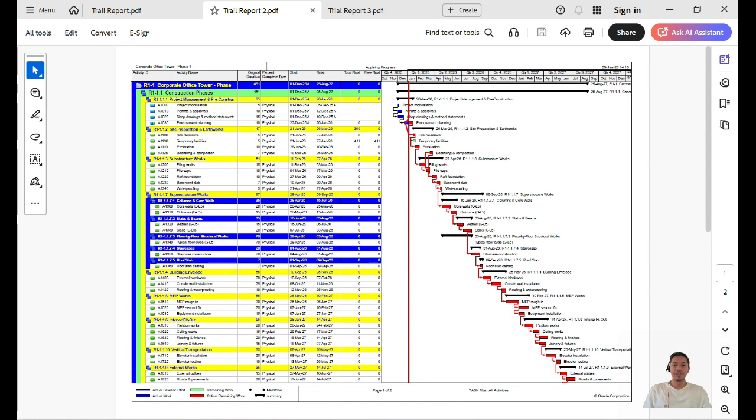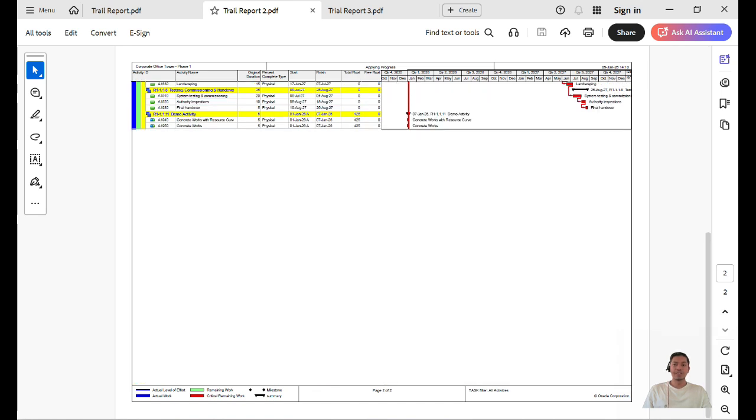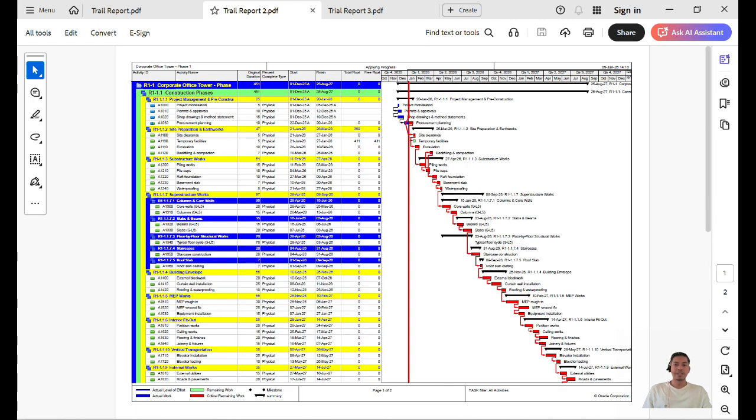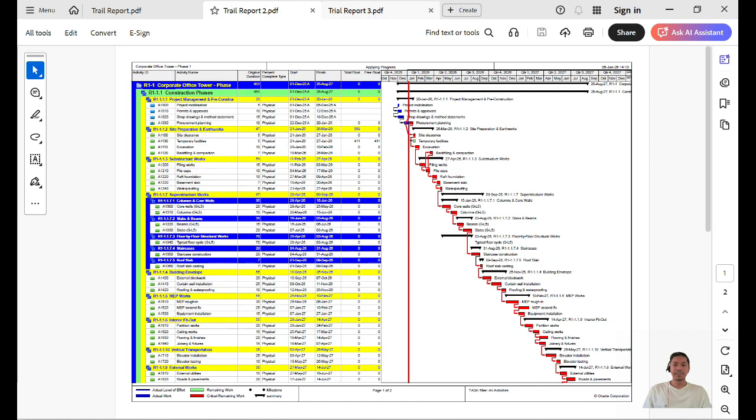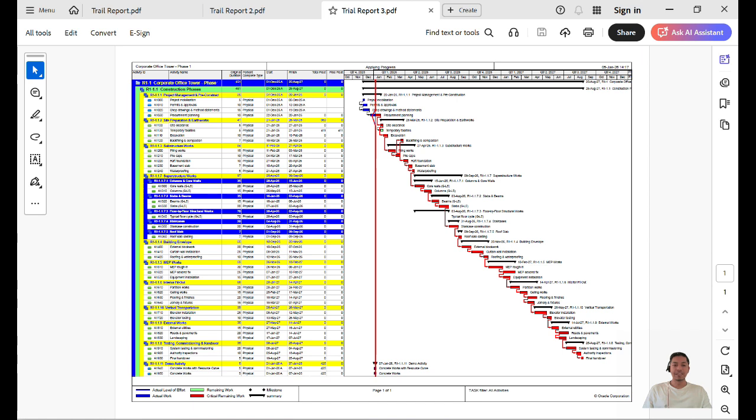It is readable as well when you print it, and it is 100% without shrinkage of the report that P6 gives us while we use the print feature. And the third is the report which we managed to print on 1 page using the adjust to feature, and it has been adjusted to 85% of the original. The report will reflect the same thing in the 3 cases, but the way of presenting it is different. That's all regarding the page setup and printing the report in PDF format.